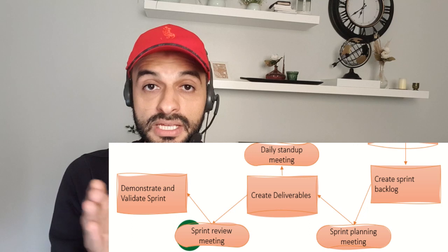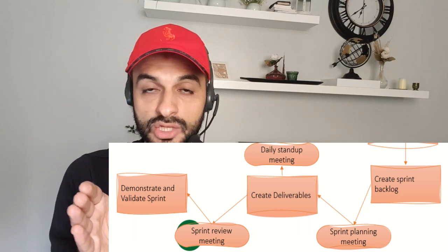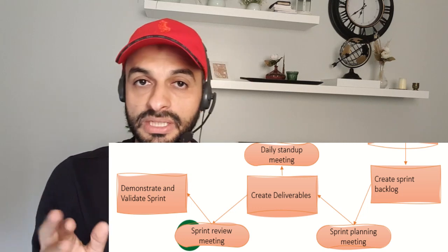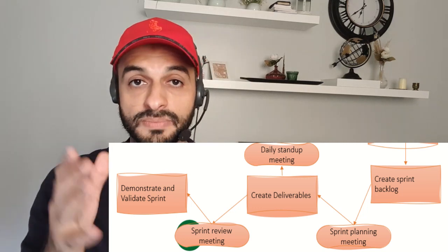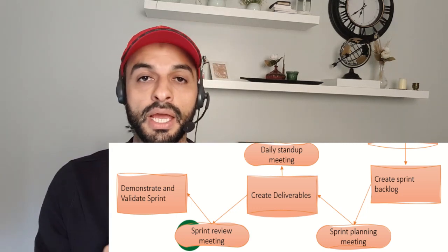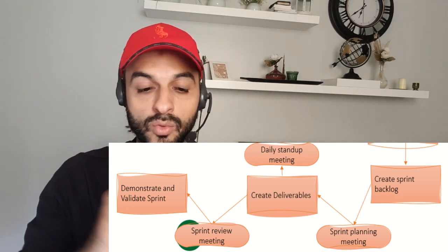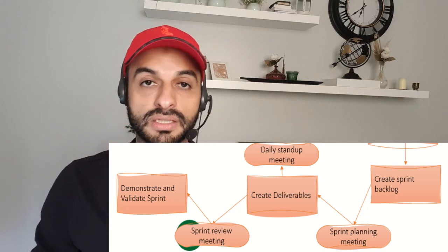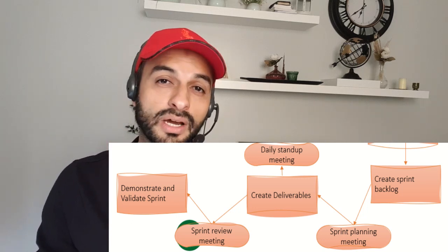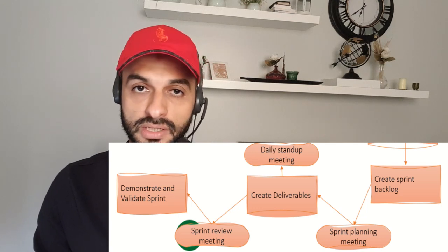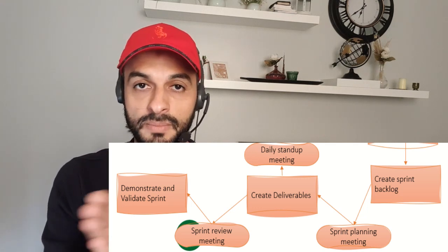And inside the sprint itself, inside this week, you do a daily stand-up meeting. Daily meeting again with the team, you and the team. Daily meeting, 15 minutes in the morning. You discuss 3 points: what we made yesterday, what we will do today, and what are the troubles or problems that we may face in achieving our targets. So the daily stand-up meeting is in the middle, every day.